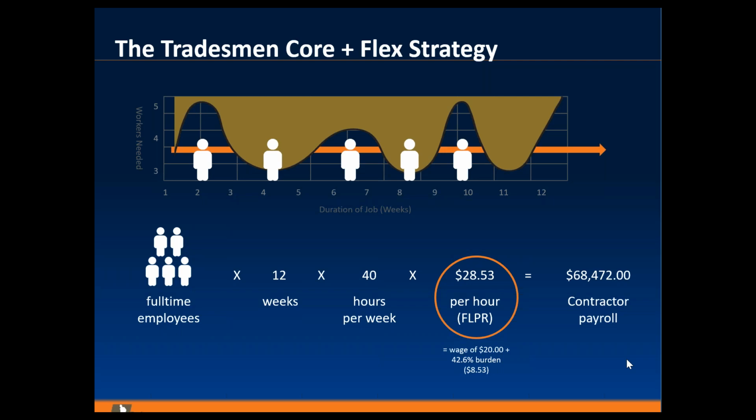But the real analysis that tradesmen would provide would be to really, in advance of the project, like John alluded to, sit down and talk about the ebb and flow, or the peaks and valleys, of the project. And I talked a little bit about those earlier. We always seem to be racing to get to an inspection so we can get a performance payment or a draw. Then usually after that point, there's a lull. And then again, there's the next inspection, or there's a sub in the way. And what it does is it creates that downtime.